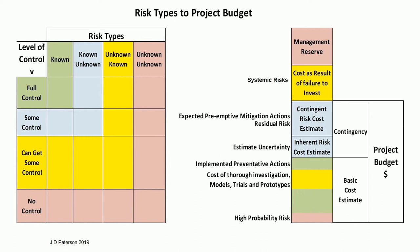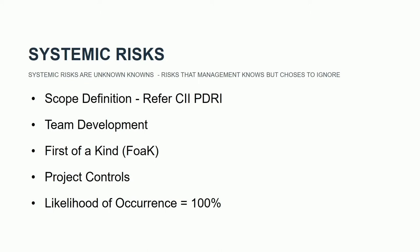Over here is the project budget: you've got a basic cost which includes work you can do by investigating models, trials and prototypes. Here are the contingencies — the inherent contingency due to quantities and rates of production, the contingent risk for events, and up here the systemic risks. These are risks that are a nature and culture of the organisation, made in four major areas: scope definition, team development, new technology, and project controls.